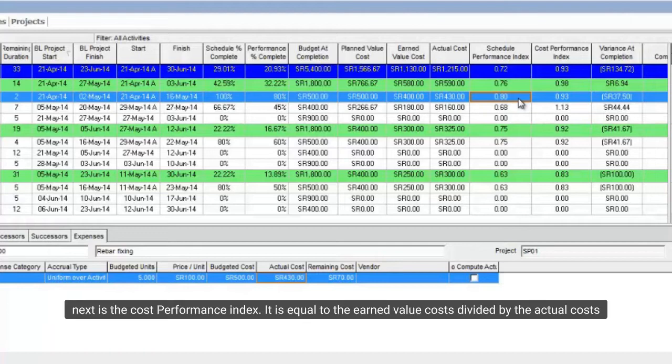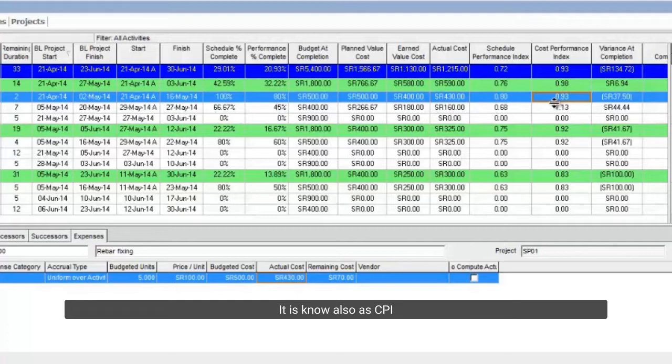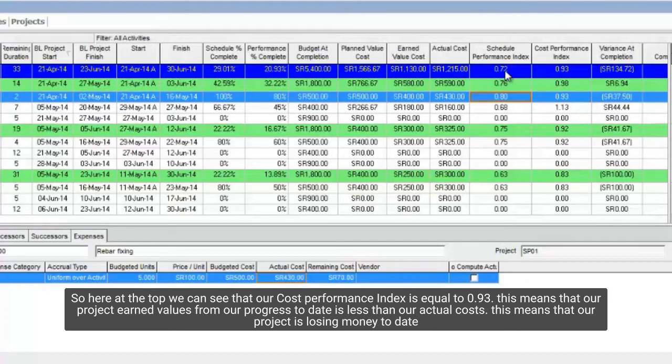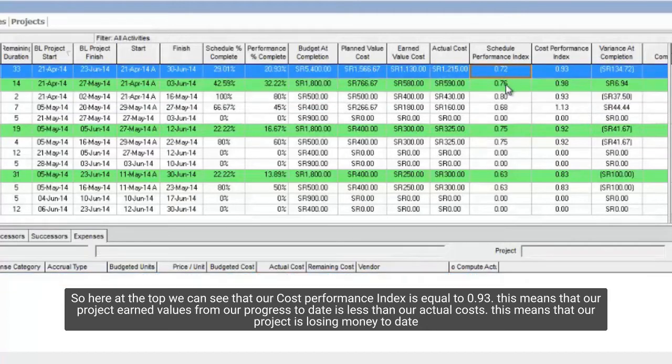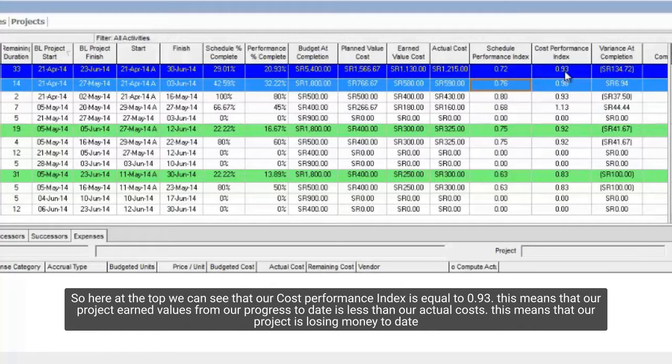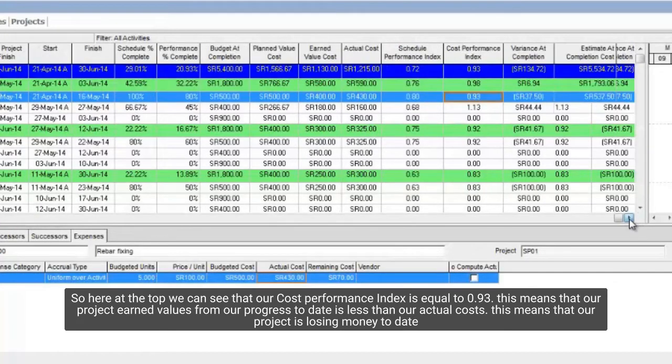Next is the cost performance index. It is equal to the earned value costs divided by the actual costs. It is known also as CPI. So here at the top we can see that our cost performance index is equal to 0.93. This means that our project earned values from our progress to date is less than our actual costs. This means that our project is losing money to date.